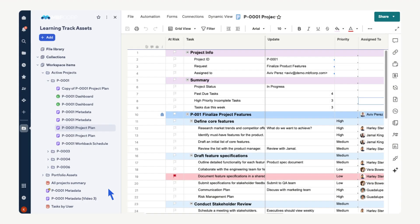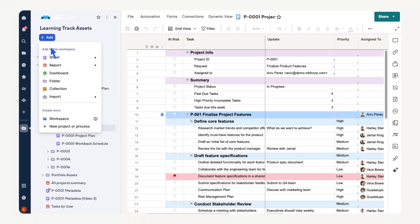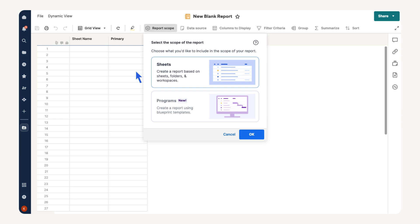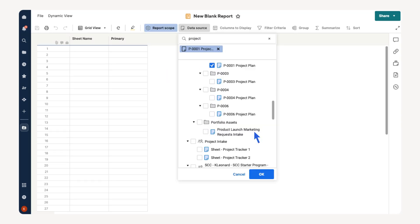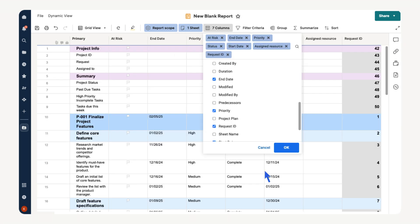Let's configure a row report first. Select add then select report then row report. Choose sheets then ok. Choose the sheets you want to pull data from. In this case we will use the project plan for our first project. Select ok. Pick the columns you want displayed on the report. Select ok.